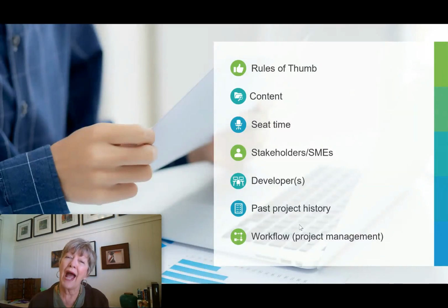You need to know what your past project history is. We take copious records, and we do that a lot automatically. So you need the software to be able to do that. And what we do is we track every single project. So we have a good broad idea of what kind of projects we've been handling for the last 23 years. And we know how long it took to develop it, with both animations, media development, instructional design, analysis, all of it. So you need to keep historical records, and that's really important.